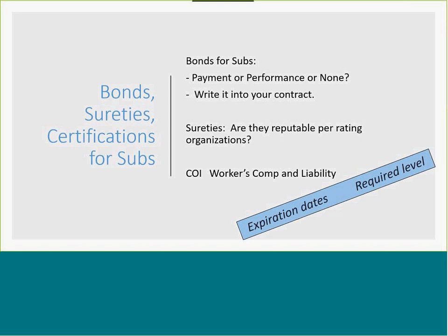So there's 4 things: extended discovery periods, no notice, pass-through, and pay-if-paid. All are warning flags, especially for moving up in the bond hierarchy, getting bigger and bigger, better quality bonds.